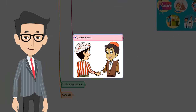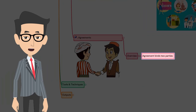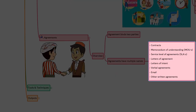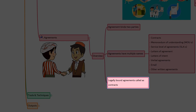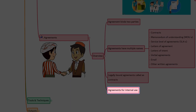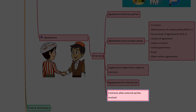Now let's talk about agreements, the next input. Agreements represent a relationship between two parties — this obligates the seller to provide the specified product, service, or results and obligates the buyer to compensate the seller. Agreements have multiple names such as contracts, memorandum of understanding, service level agreements, letter of agreement, letter of intent, verbal agreement, email, or other written agreements. When agreements become contracts, contracts legally bind two parties. But remember, just an agreement alone won't bind two parties — it's a contract that binds two parties. Agreements are mostly used for internal purposes, to define the initial intention of the project. Contracts are used when external parties are involved.